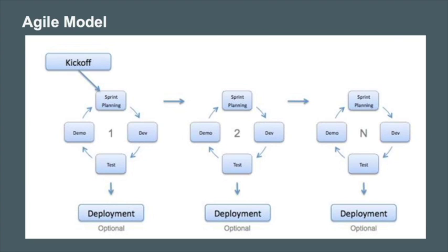Third, unlike the waterfall model, in the agile model very limited planning is required to get started with the project, because agile assumes that the end user's needs are ever changing in a dynamic business and IT world. Changes can be discussed and features can be newly added and removed based on feedback. This effectively gives the customer the finished system they want or need.